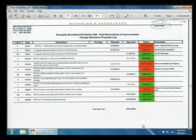We rejected the alternative crumb rubber for the Nike grind. That was $110,000. That was rejected. We revised the storm trap lift station, and that was for Reamer to remove the water hydrant cost. So that's been revised. You have 8R, which is the new price, and then 9 is the price for the changing of the stone. So roughly, we're about $254,000 into our change allowance budget.